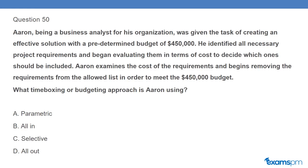Question 50: Aaron, being a business analyst for his organization, was given the task of creating an effective solution with a predetermined budget of $450,000. He identified all necessary project requirements and began evaluating them in terms of cost to decide which ones should be included. Aaron examines the cost of the requirements and begins removing requirements from the allowed list in order to meet the $450,000 budget. What timeboxing or budgeting approach is Aaron using? A. Parametric. B. All in. C. Selective. D. All out.